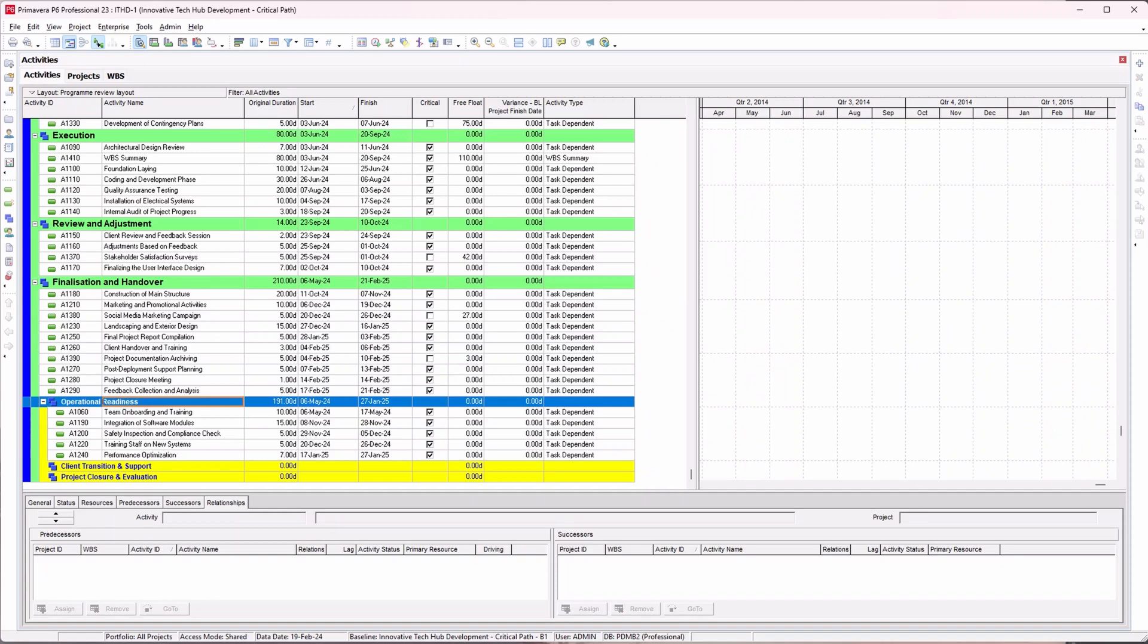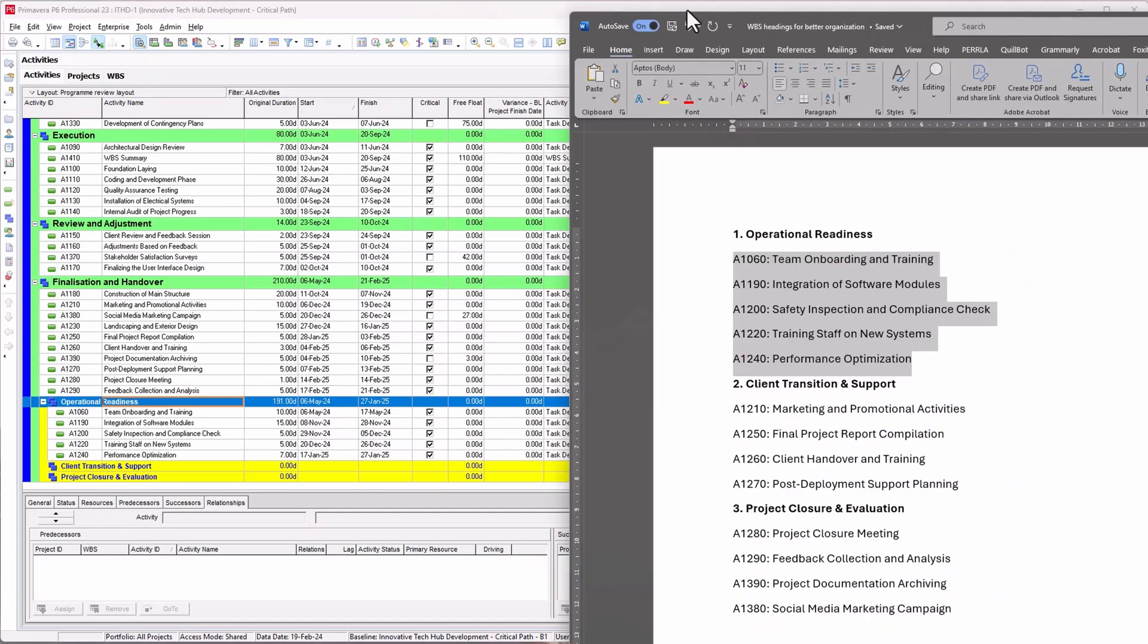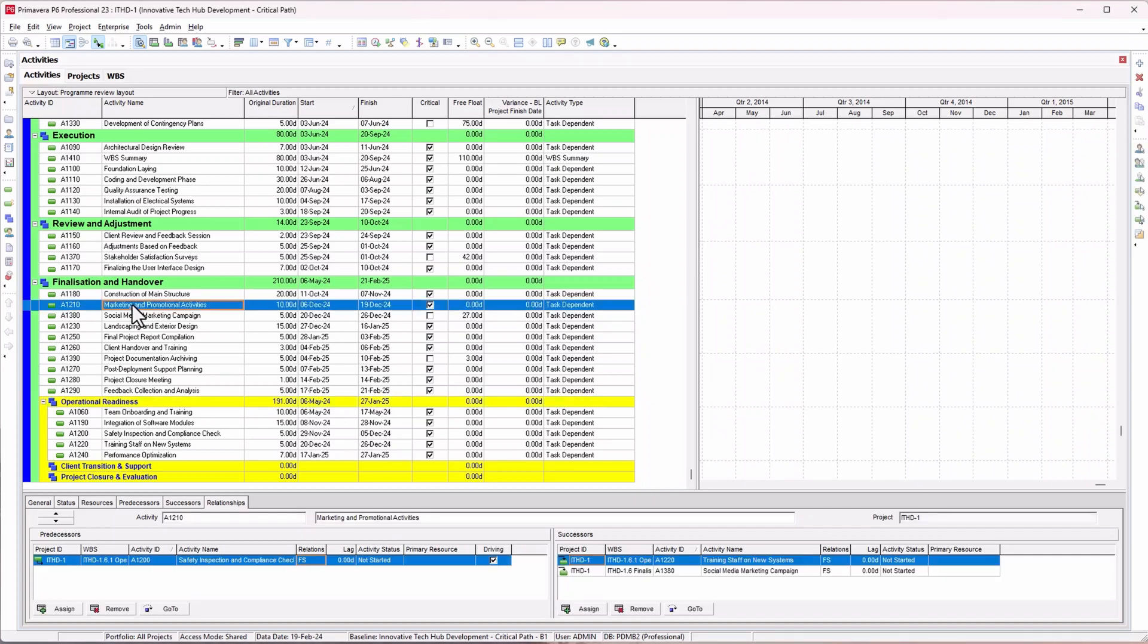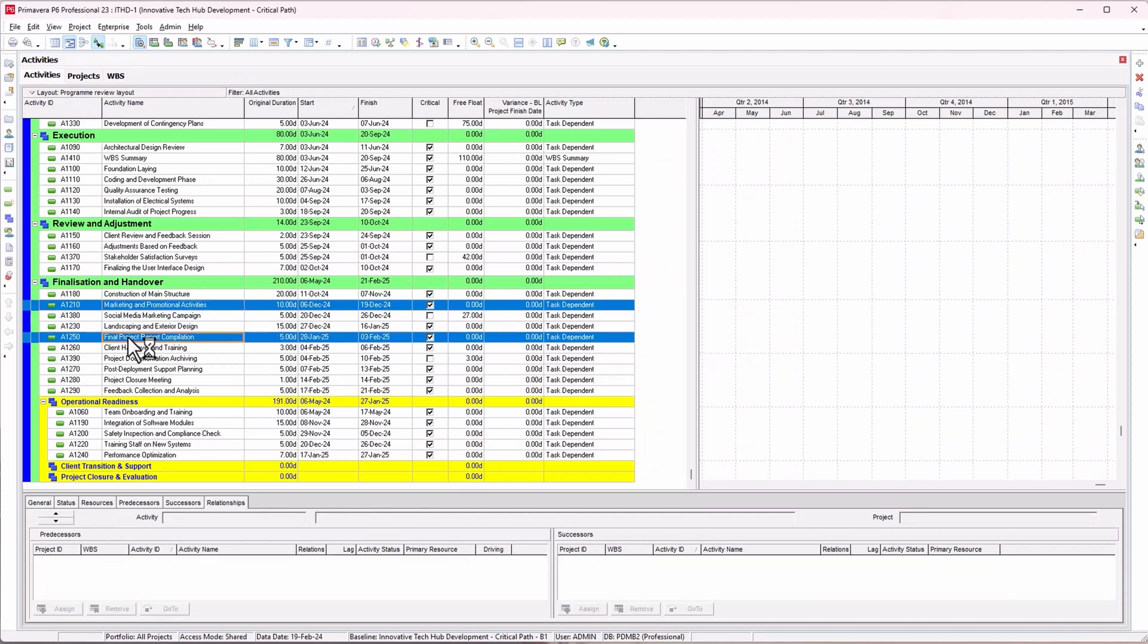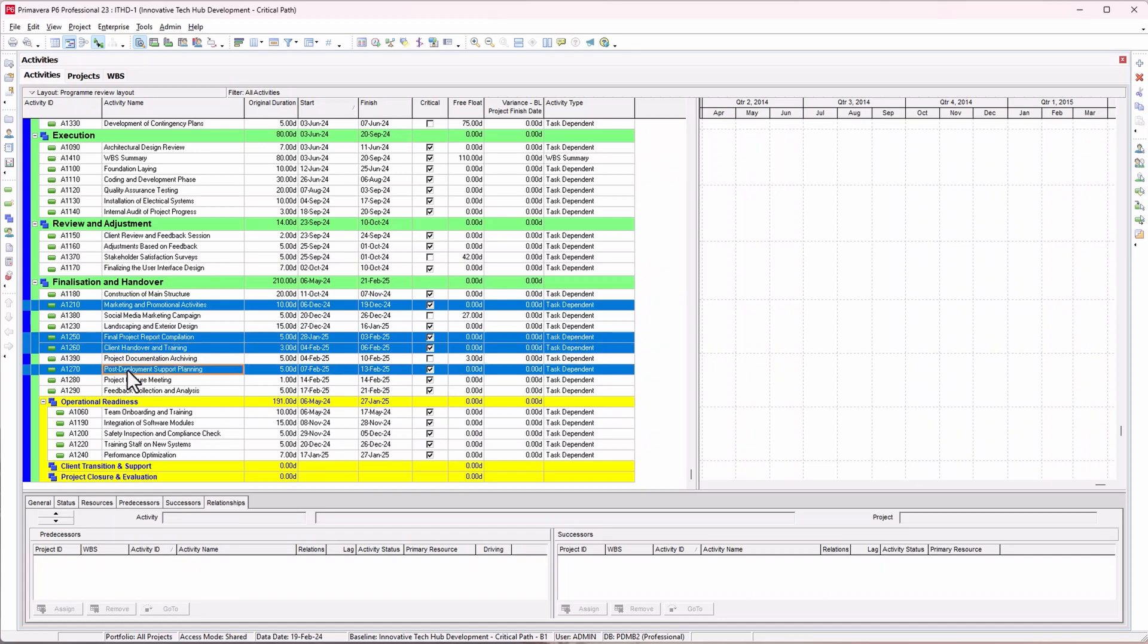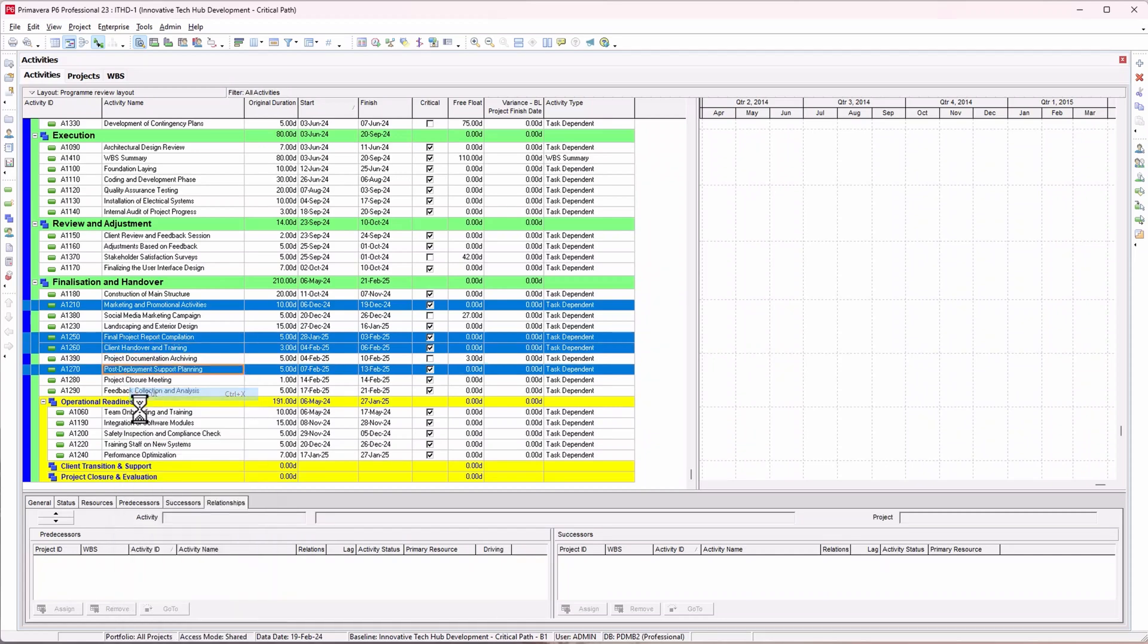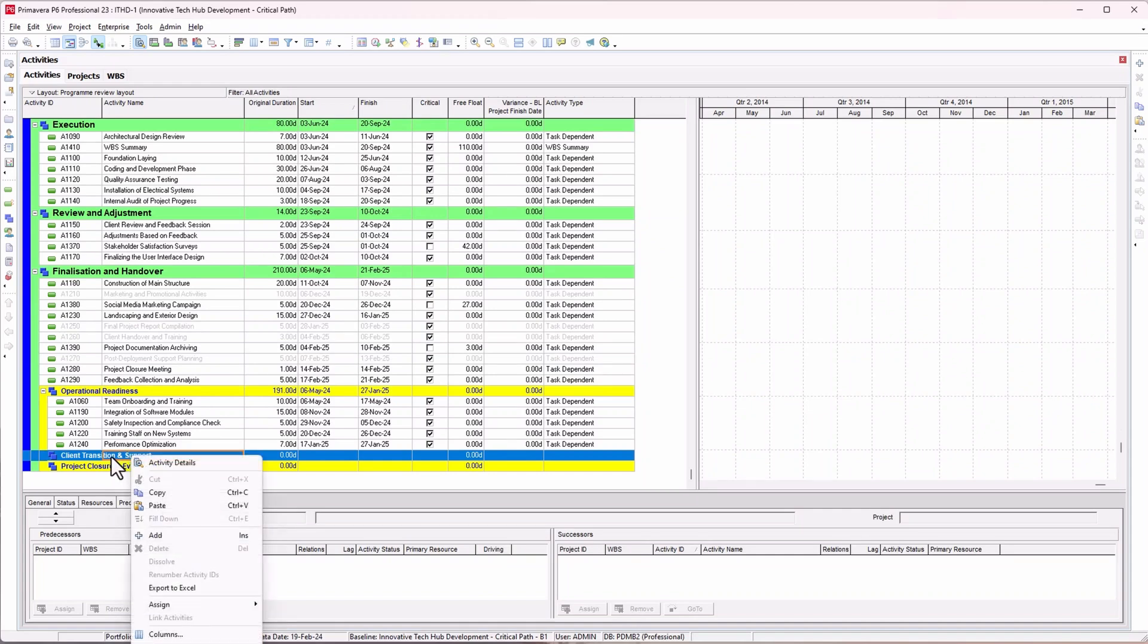Next is client transition and support. I need to add marketing and promotional activities, final project inspection, final projects report compilation, client handover training, and post deployment. I'll cut these and paste them to the level of the WBS I want.